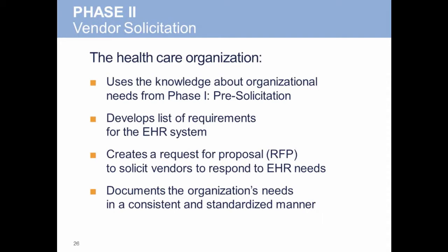Next is an implementation plan, which includes a basic implementation plan with estimated timeline. Next is a hardware and configuration specification, which provides a list of hardware requirements and your configuration options, client server, SaaS, etc. Finally is the cost estimate, including detailed costs for each item.